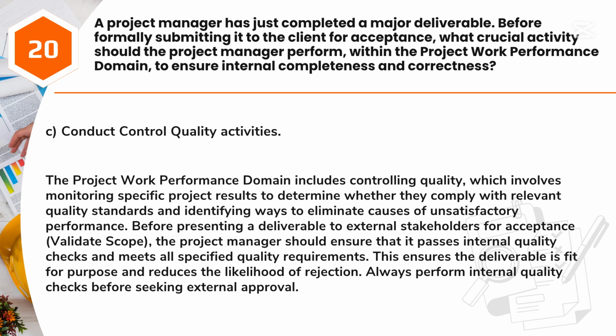Answer: C. Conduct control quality activities. The project work performance domain includes controlling quality, which involves monitoring specific project results to determine whether they comply with relevant quality standards and identifying ways to eliminate causes of unsatisfactory performance. Before presenting a deliverable to external stakeholders for acceptance, validate scope, the project manager should ensure that it passes internal quality checks and meets all specified quality requirements. This ensures the deliverable is fit for purpose and reduces the likelihood of rejection. Always perform internal quality checks before seeking external approval.